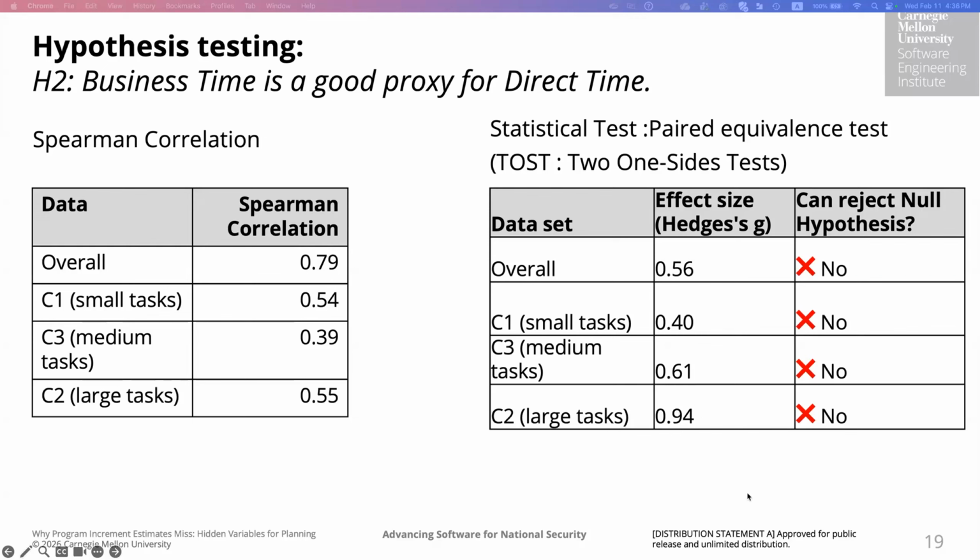So what we see is that business time corrects for maybe some systematic calendar biases, but it still does little to reduce the underlying noise. And for large tasks, the correlation is already strong because the capped business hours scale proportionally with the long durations. For small tasks, they rarely cross date boundaries. So excluding weekends or capping 8 hours basically changes nothing.